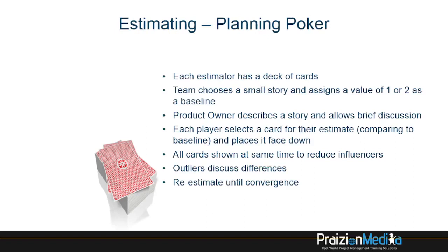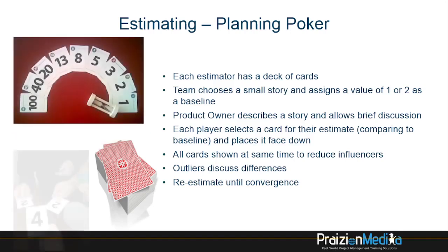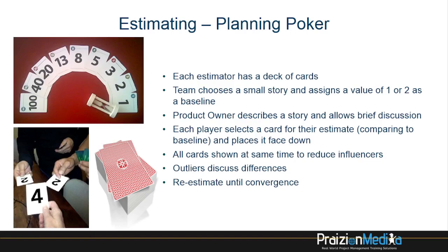And then we take a story from the deck or from the backlog and we decide, let's estimate this one. And on the count of 3 or whatever, the team shows their cards. And remember, these are not days. These are not hours. These are arbitrary numbers that take away that abstract idea of duration. So we're talking about size and complexity predominantly. And based on this, we assign story points.